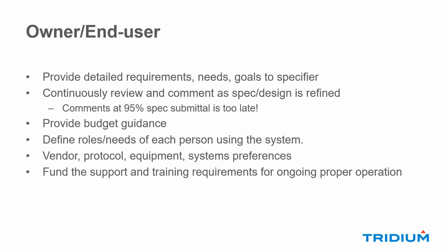Sometimes specifiers don't have as much access perhaps to the owner and their facilities people as they need, but I think it's a really important part to be able to do that. And I also believe that the owner and end user should be continuously reviewing and commenting on the spec and design as it's refined. Waiting till the 95% spec submittal is way too late to make comments, I believe.